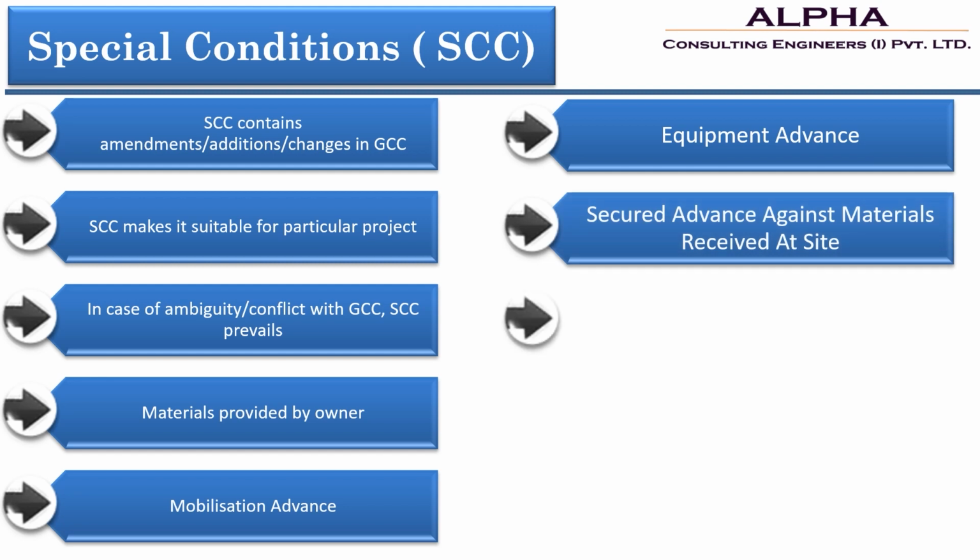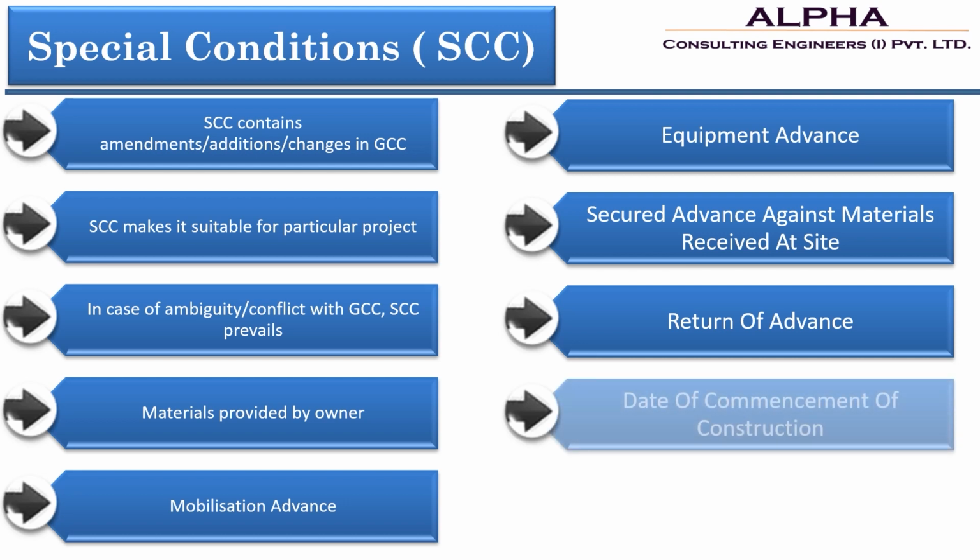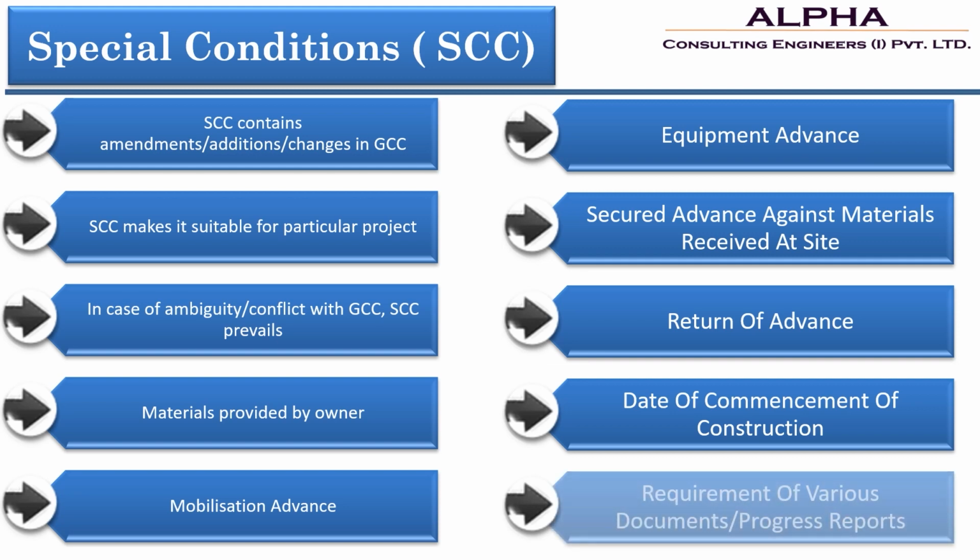Return of advance, secured advance against material received at site, requirement of various documents, progress reports. These are also some of the conditions which generally change with a particular package.